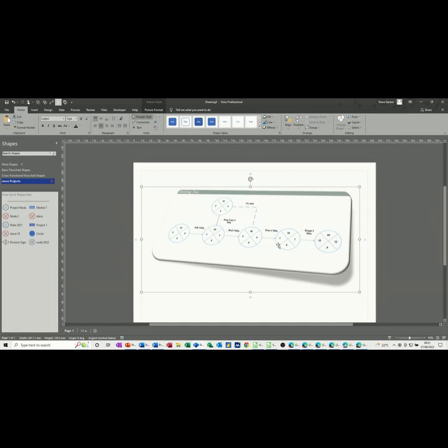So in this example, this is the critical path because this task, prep cups, can happen anytime during this 5-minute period. So it's got a float of 4 minutes, so anytime it can happen. And then this dotted line just represents a dummy line to get back into the main flow. So these sort of shapes are not default in Visio, so we're going to have to recreate one of these shapes, and that's what I'm going to do on the next sheet.